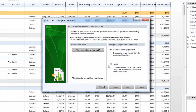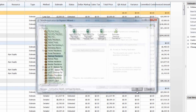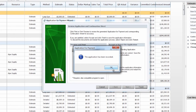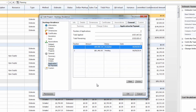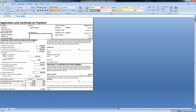Once you've reviewed that you can come back here, choose to accept this, click finish, save it back to the job, and it will let you know it has been recorded. Now if you would like to review your applications at any time you can come back to this QuickBooks integration tab, choose the application for payment drop-down, and choose to view applications for payment. This will give you a summary of how many applications you have currently generated, the total amount applied, the total remaining or balance to finish, and then it will give you a breakdown of each of the previously generated applications, their status, the date created, and the amount they were created for. If you would like to view any of these again in detail, just highlight one, select view, and it will bring up that preview that we had just generated.